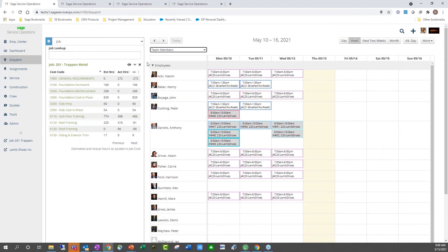On the left-hand panel, there are some options for the job. There's a job lookup at the top, which is a direct connection into your Sage 100 Contractor system, so you can search for a different job within the solution. Underneath that, I can see job 201, Trap and Motel, and all of the different cost codes for this job. From here, I can see the estimated hours, the actual hours, and the variance between the two, giving constant visibility into cost codes.